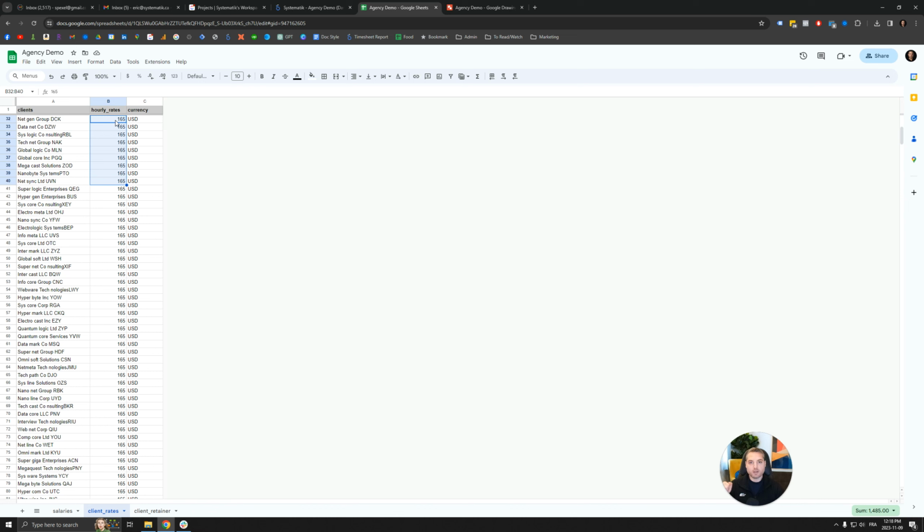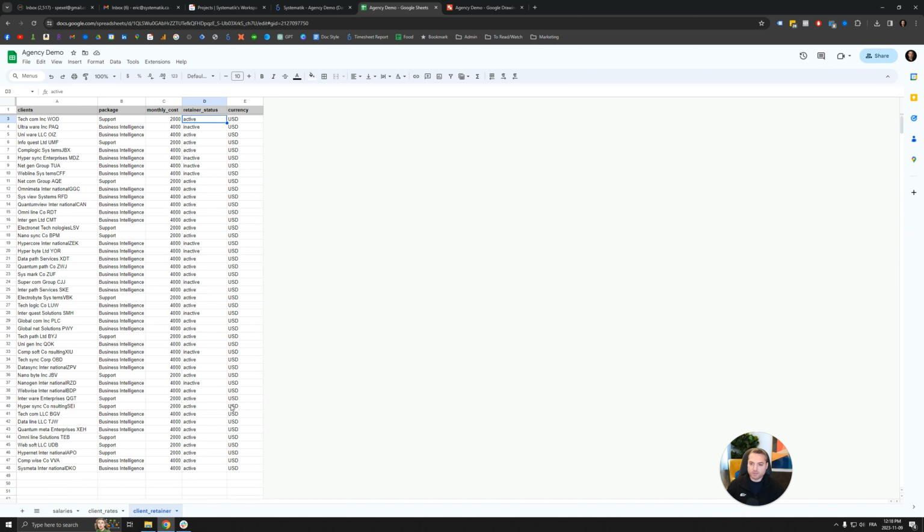And if it's a fixed price project, then in your project management tool, you create a custom field and input the price of the project, and the moment we see a project price, we don't calculate the hourly rate. So it means that you could have a client that has both a fixed price project and an hourly rate, and the system would still be able to handle that, which is really cool, and this has been very useful for us.